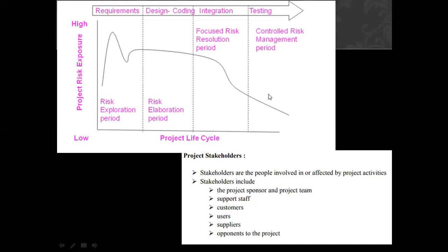Another thing that you can utilize, if the question comes up that you have to discuss the waterfall model in practice, is that you can talk about the requirements, that it is a requirement-driven approach. Once the requirement is completed and you have the precise requirement definition, then you start implementation over it. That means on later stages changes in requirements are not possible, and that can create some chaos on later stages. So that point also you can talk about.